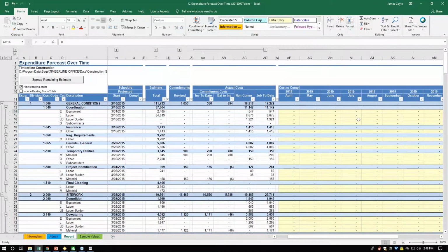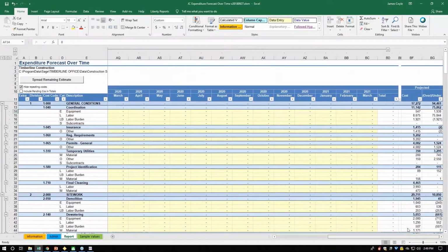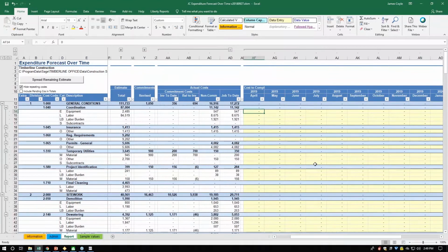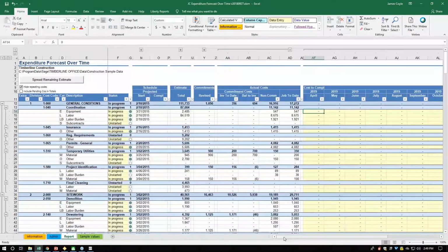If you have already started, then you've got your actual cost and you've got your estimate. So by row, there's a difference. So we'll calculate that difference, and then we'll spread that number across here. That's what it does. And so now you've got an interactive workbook with everything having to do with your job on it. And if there's more you want to add to this, you can.